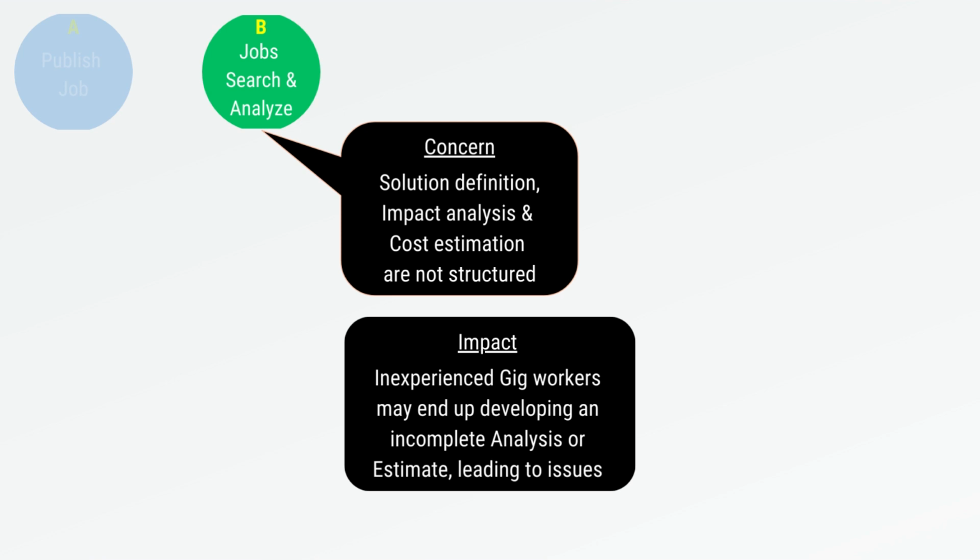Freelancing platforms do not provide any tools for iterative documentation of impact analysis and corresponding effort and cost estimation. This means that inexperienced freelancers may end up missing out on solution components or other key aspects. It could also lead to inappropriate assessment of efforts, schedule, and costs for the various tasks. The larger implication is, when a contracted freelancer is under pressure due to an incorrect estimate and under threat of losing out on the project's viability, they may abandon the contract and walk away. This could also result in avoidable disputes, if proper planning and structure was applied during the impact analysis and effort